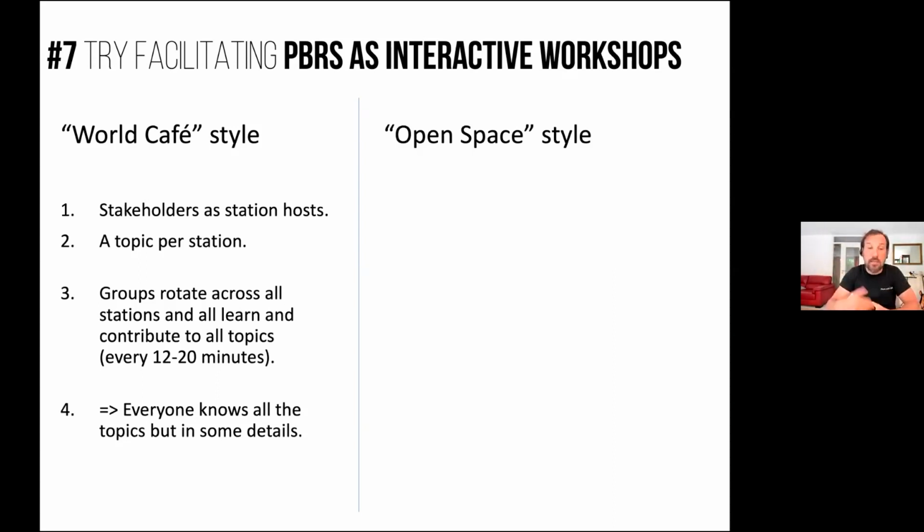And whatever the previous teams have been discussing keeps growing into an artifact, like a bubble diagram of your requirements or more details or specification by example, whatever technique you are using. At the end of this exercise, everyone knows about all the things, but not in many details, right? Because you spend maybe 12 minutes at each station, you know about every requirement, but you have this cool flexibility. Actually, any team can start working on any requirement, more or less, if they are really cross-component and so on.